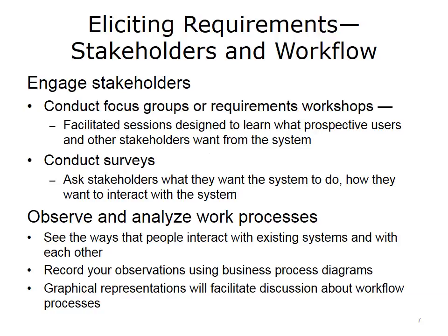Consider retaining a skilled facilitator who is not on your project team. Facilitation is a particular skill and needs to be fully understood for its value in roles like this. What is likely to emerge from focus groups and facilitated sessions is a consistent set of requirements for which there's been discussion and general agreement among the stakeholders. If you have a facilitated session, also consider designating a person to be the recorder who will capture decisions and send that information as a document to confirm everyone's understanding of what transpired.